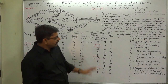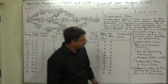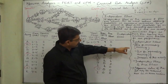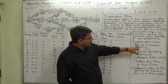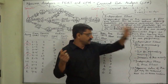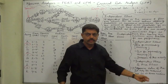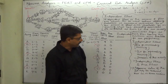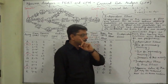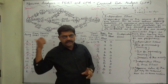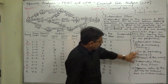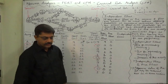For calculation, the formula can be somewhat complex. Independent float equals the earliest start time for the succeeding activity minus the latest finish time for the preceding activity, minus the duration of this activity.